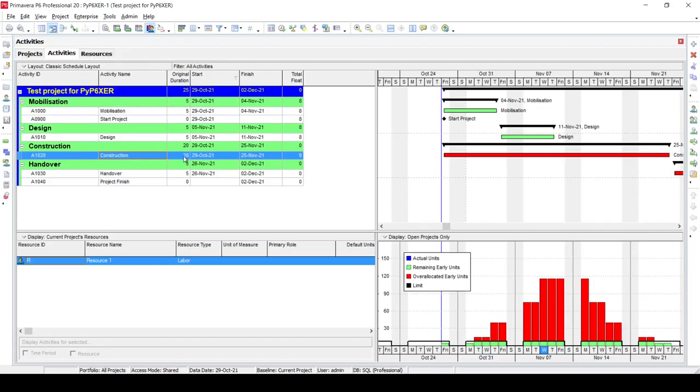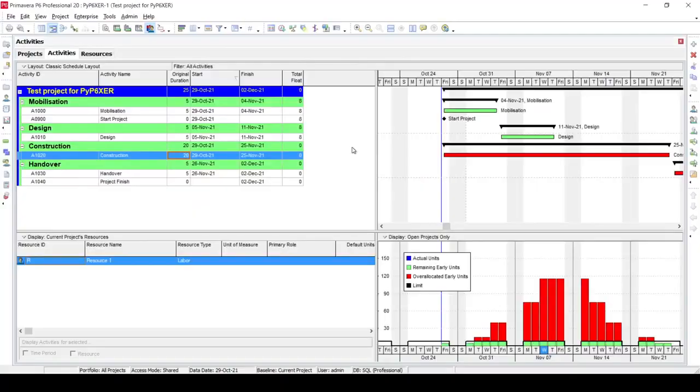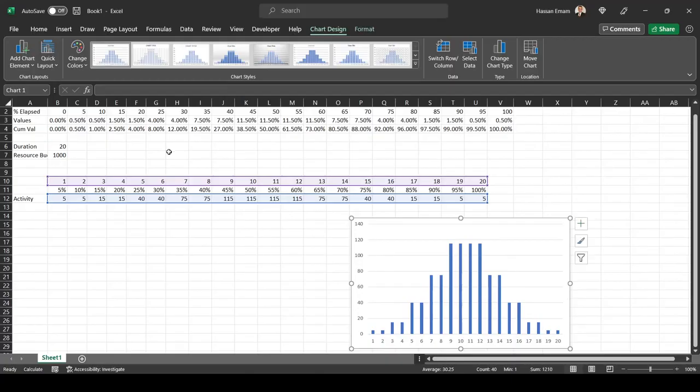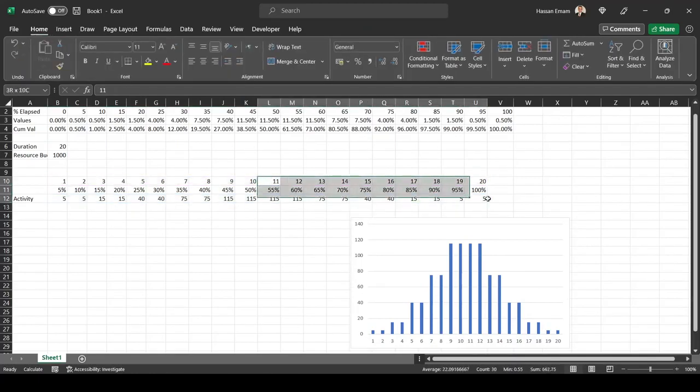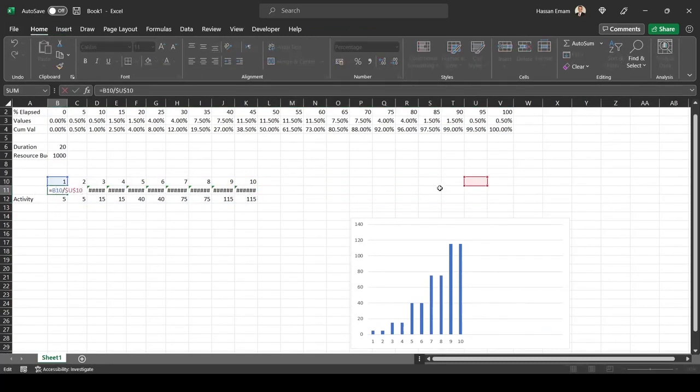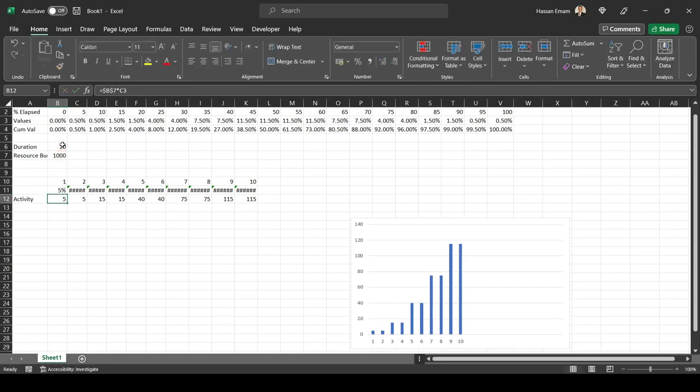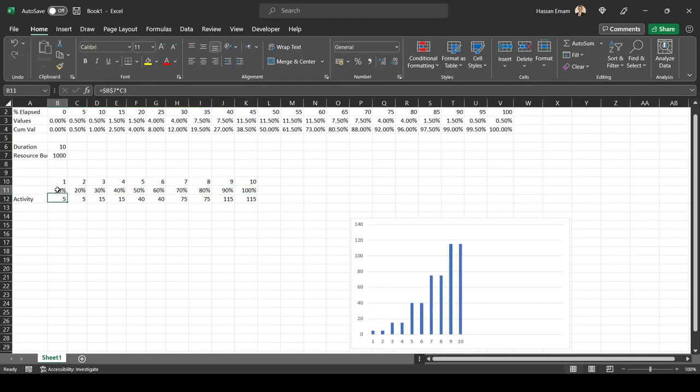Another challenge would be what happens if this is not 20? Because 20, I've selected the number 20 because it matches or corresponds to those 20 periods. But what about if we have this number or this value is 10? Ten also will be quite easy. What I'm going to do is take out this and then just change this calculation here and make it divided by 10. Or if we want to keep that more flexible, you can just divide by the 20 in here and then say that the duration is 10. So that's 100, so 10 percent.